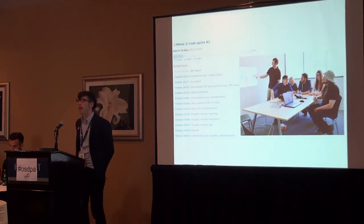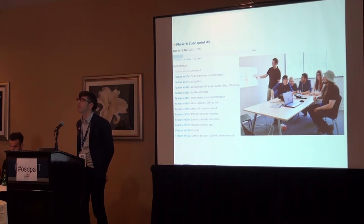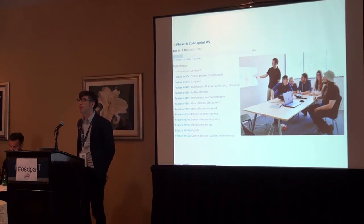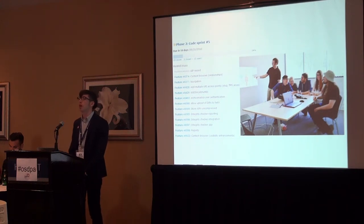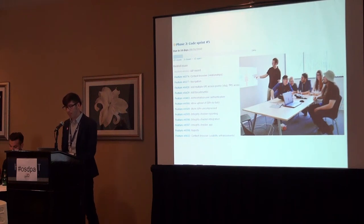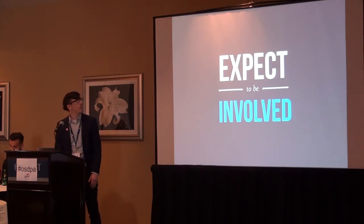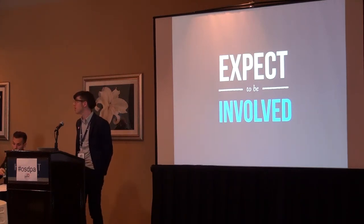Following the agile methodology, we divided phase two into a series of five sprints, each with about six concrete deliverables planned at roughly 300 hours — what our small team could handle in a development phase. We also had weekly internal project meetings followed by bi-weekly reports from our project manager and a teleconference with Ben to review progress. If there's one takeaway from this whole process, it's this: if you want your final deliverable to go beyond just the most minimal requirements, you need to expect to be deeply involved in the process. MoMA understood this from the outset, which is why they insisted on the agile methodology.